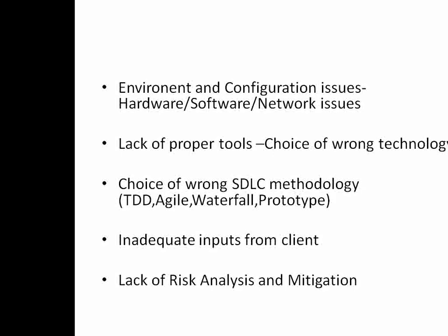Lack of proper tools. Sometimes we choose the wrong technology. Suppose I'm doing a project in Java. In the midway, I realize that if I had chosen .NET, I would have by now completed the project successfully and delivered it to the client. The client does not worry about .NET or Java. At the end, the speed, performance and the quality matter. So always invest some time in the planning phase of the project. If you ask me, I will invest 13 to 15% in the planning phase. Somebody will say 10%, somebody will say 25%.